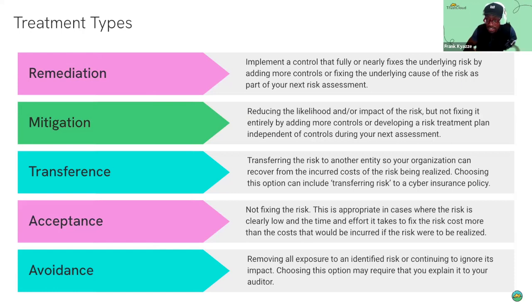But remediation, mitigation, I think I take a pretty tactical approach to these two treatment types when it comes to mitigating and remediating risks using project management and KPIs, right? Treating mitigation, remediation efforts like projects. The epic is risk management, and you have little tasks, little project tasks with assignees and due dates. And if you're using a work management tool like Jira, the benefit of that is you can tie those efforts to actual ongoing work. Maybe it's in engineering or development or marketing or sales, depending on the type of risk.